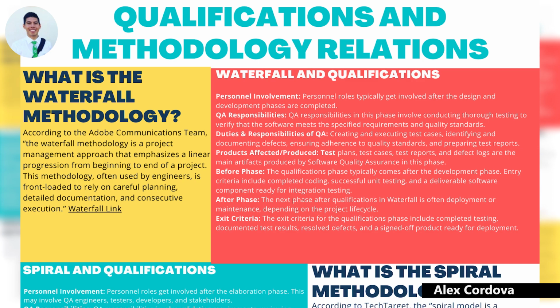The qualifications phase typically comes after the development phase. Entry criteria include completed coding, successful unit testing, and a deliverable software component ready for integration testing. The after phase includes qualifications, often deployment, maintenance, depending on the project lifecycle. The exit criteria for waterfall and qualifications include completed testing, documented results, resolved defects, and the signed-off product ready for deployment.